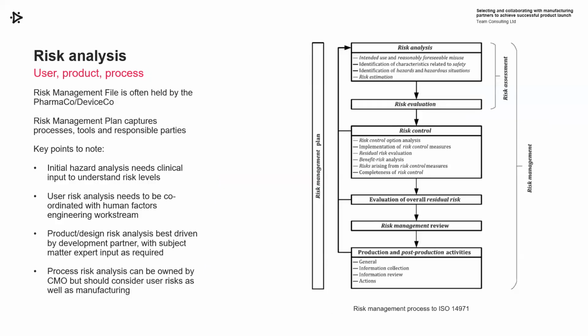Risk analysis is obviously a huge strand in the development of medical devices, covering user risks, product risks, process risks. Risk management file produced as part of 14971, generally held by the company who will be commercial manufacturer, Pharmaco, Device Co. The risk management continues post-launch through things like post-market surveillance, so it makes sense for good continuity for them to own that file, although a lot of it can often be generated by development partners and manufacturing partners. The risk management plan will capture who's responsible for which part of the process and which tools and systems are going to be used.